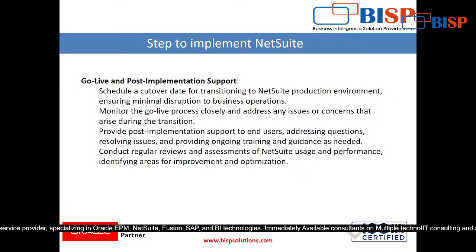Now in the production instance, again one more testing session is organized with the client employees, and with them one more user training session is done. And once they are satisfied, once they give the okay or the green flag that, yeah, we are okay with it, then this is called the go live. Then this data is ready, and from tomorrow they are ready to work on NetSuite.